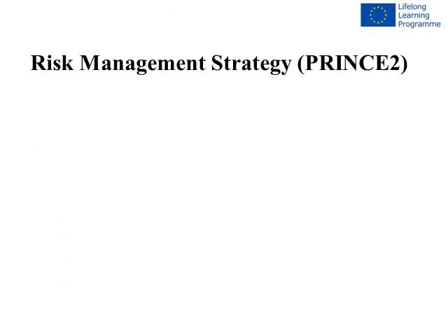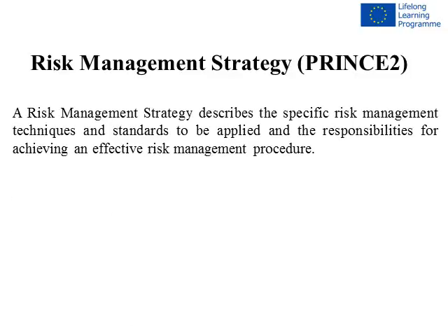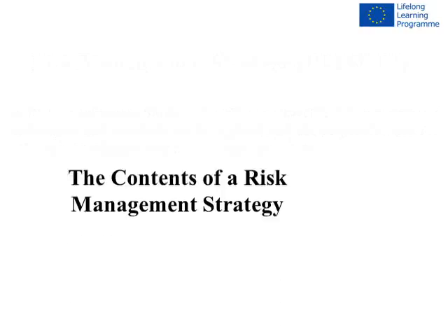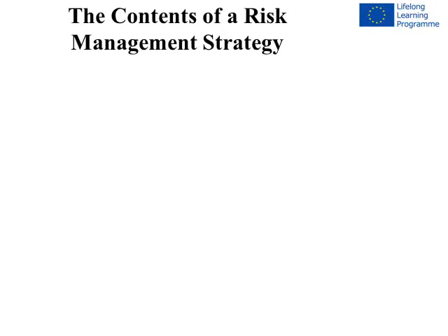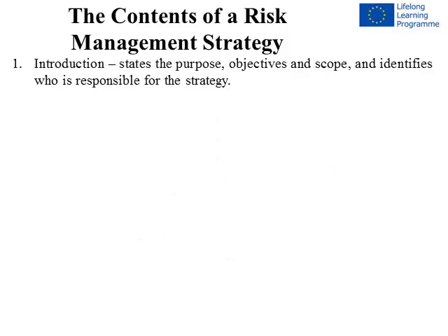PRINCE2. A risk management strategy describes the specific risk management techniques and standards to be applied and the responsibilities for achieving an effective risk management procedure. The contents of a risk management strategy. 1. Introduction. States the purpose, objectives and scope and identifies who is responsible for the strategy.